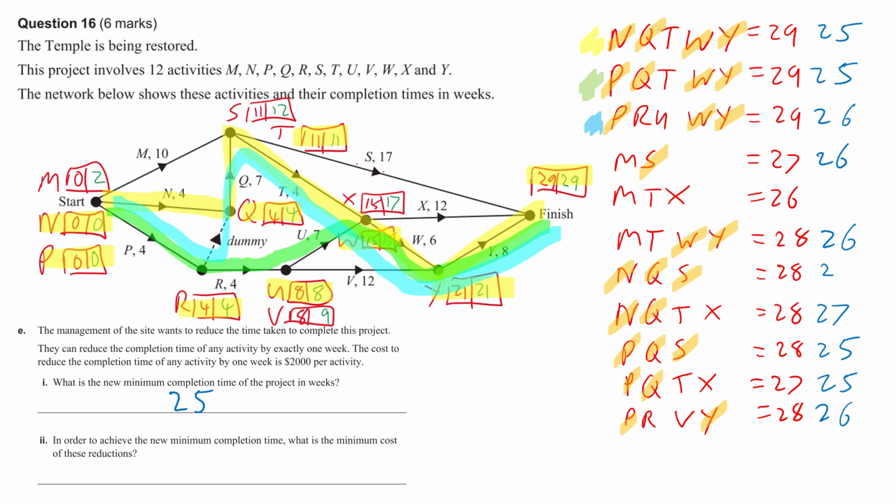That's 25, and that's 26. Now, we've had a critical juncture a couple of times here. So here, completely crashed, here, completely crashed. So you can see that those two have been completely crashed and can't go any more. So we have to get everything else down to 25.